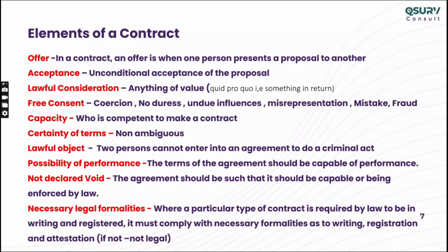So when you receive the power of attorney, check he's a major. You can put a declaration for that: I hereby confirm that this person is not a lunatic, idiotic, or drunken person. That's the reason you always have a witness to sign. When you sign the contract, there's a witness also, and the witness is legally responsible for this capacity, by the way. Then a drunken person will never sign contracts. And in the power of attorney, you have to check the country or nationality of the person.